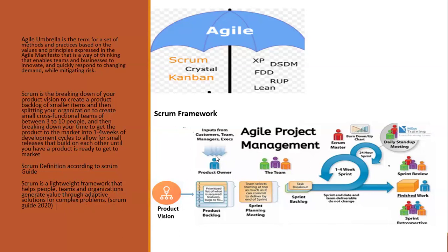Now, when you're doing Scrum projects, I'm going to define it the way we really understand it for people who have passed through this training. Of course, the first thing you need to do once you want to start a project is to get the product vision. Draft your product vision by gathering information from the stakeholders, getting information about the project, and you start from the product vision. Then you break down this product vision into a product backlog.